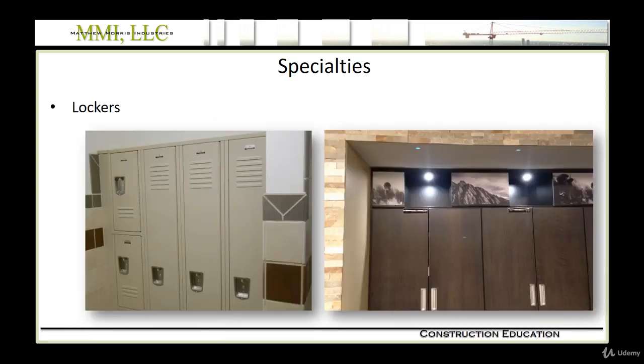Okay, a similar specialty item to the bathroom compartments would be lockers. Of course you would put lockers in a locker room or in a school, but we're also seeing lockers being installed in offices quite a bit to give the occupants a place to shower. The typical material would be steel like you see on the left, but it could be any of those materials we described in the previous slide. On the right, for example, we have plastic laminate. And similar to toilet compartments or bathroom partitions, lockers are usually installed towards the end, after tile in this case.